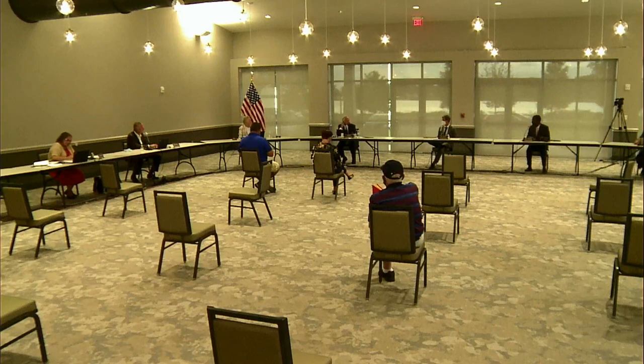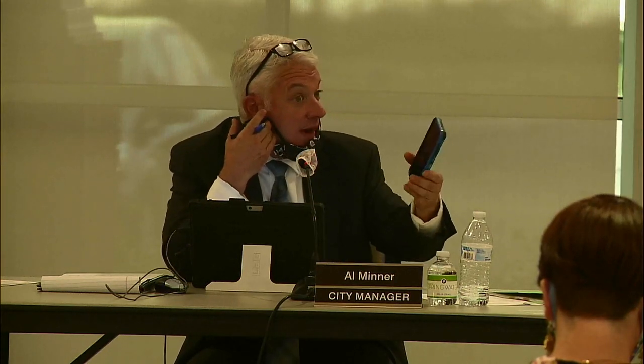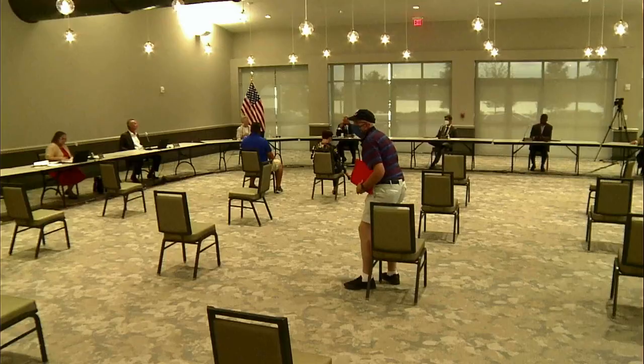Yeah, I've already addressed that with Mr. Richardson. I talked with Chief Hicks and with Riley Snively, our Chief Code Enforcement Officer, today. His situation hinged on the unpermitted work, which I'm sure was done inadvertently. That happens, and the building department has a lot of forgiveness about that. Essentially, the key is just to go back to the building department and get your permits. Once he gets his permits and gets that information to the special magistrate, the fines will stop. This goes back to when he pulled his permits, which is pretty recent. I reached out to Ann Kinsley, the building official, to have her send an email to the family. They did, and I believe he picked up his permit today. With that information, he'll be able to go back to the special magistrate, stop the fines, and then focus on the work. All right. Thank you. I think we got that one under control. Thank you, sir. Appreciate it. Thank you, Madam Mayor.